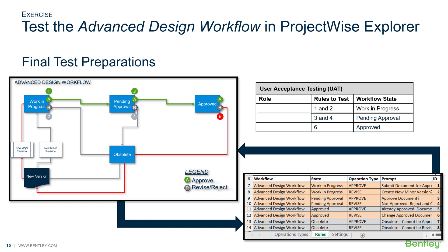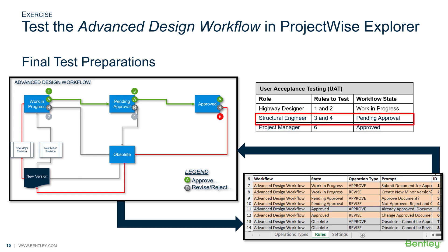Let's see where the rules fall in the workflow and which role will be testing each rule. The highway designer will need to test rules 1 and 2, the structural engineer will need to test rules 3 and 4, and the project manager will need to test rule number 6. For UAT, the users will not need to know which rules they are testing — rather, they need to know what button to press and what outcome is desired.